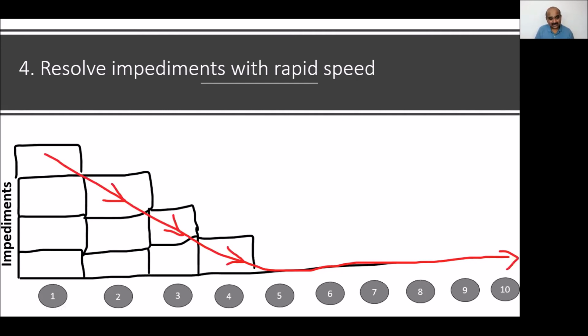See, this is possible because whenever you ask friends, do you see any impediments? They only look at the story that they're handling on the first day. No, you should identify the entire sprint payload that is assigned to you. For example, if you are volunteering to take 3 stories in that sprint, keep 3 stories in mind and raise the impediments as early as possible.